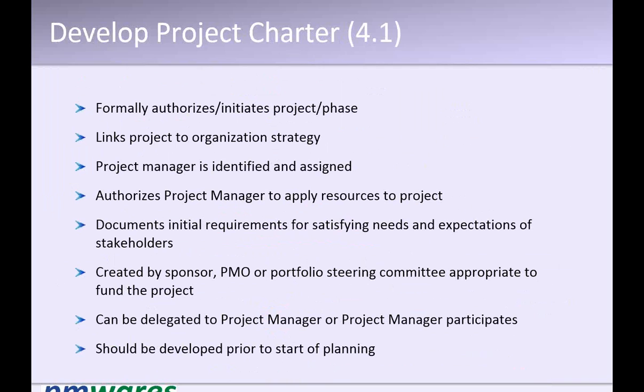And it's also the authorization to continue work. It's evidence that we are asked to start a particular task, the project. Yes, authorizing the project manager to start the project. Actually, authorizing the project manager to deploy organizational resources on that project. So through the project charter, the project manager gets authority to deploy organization resources.